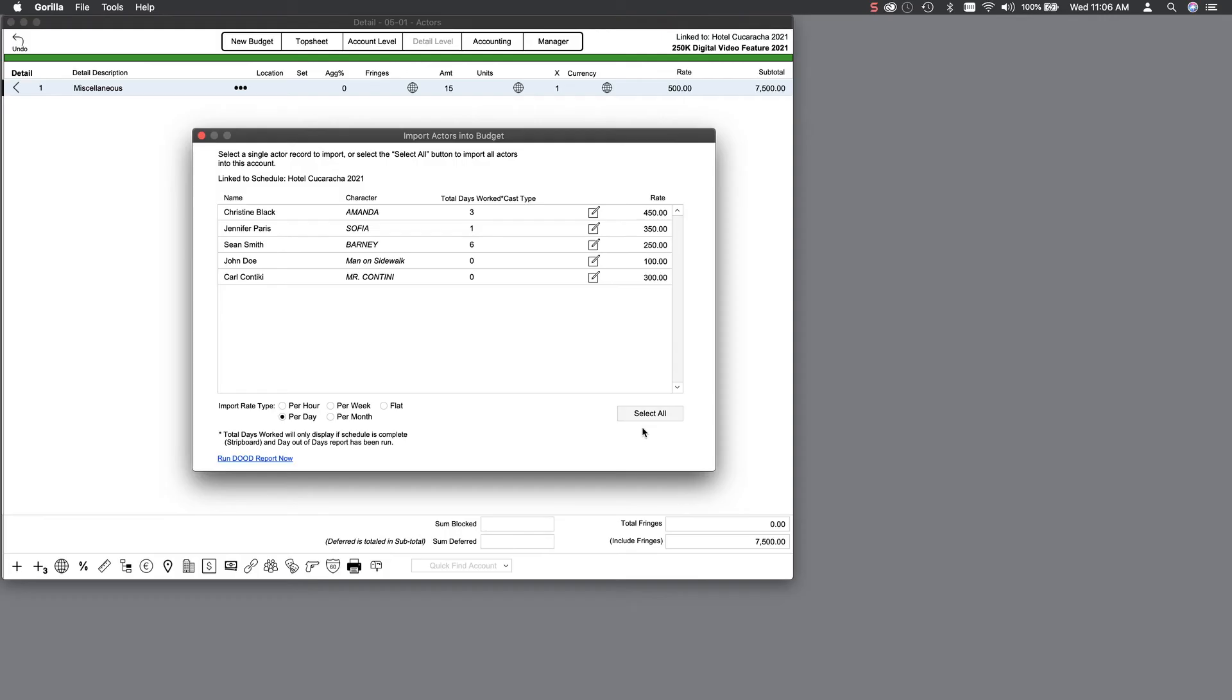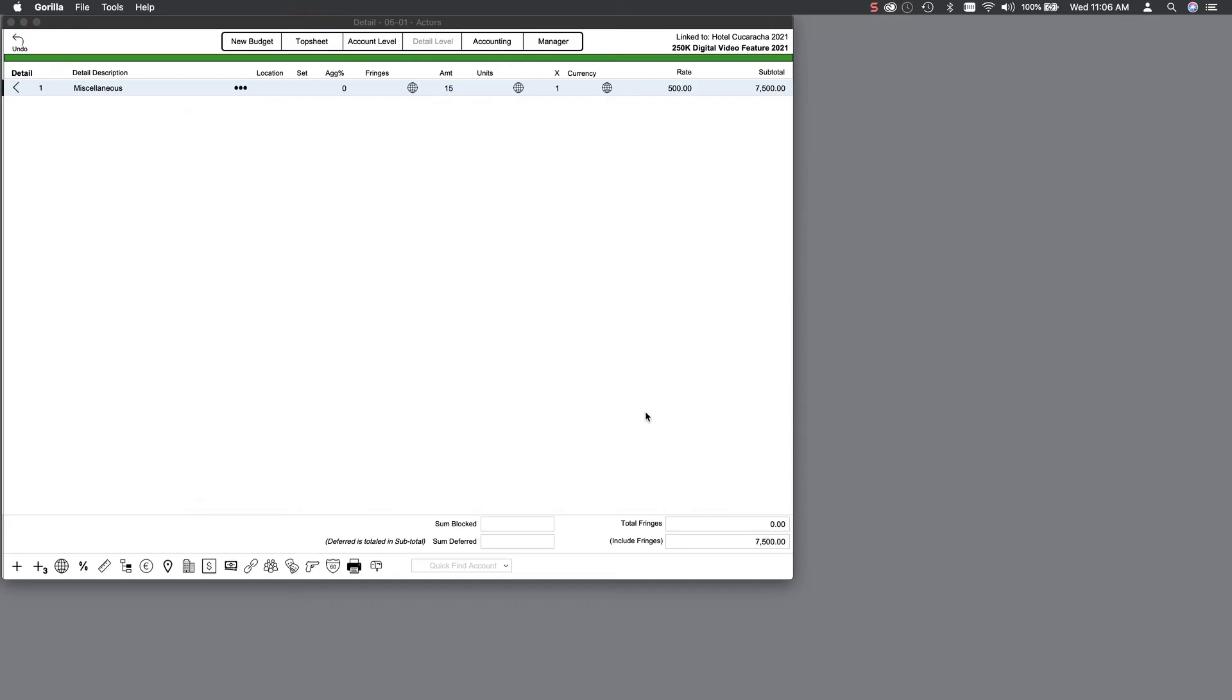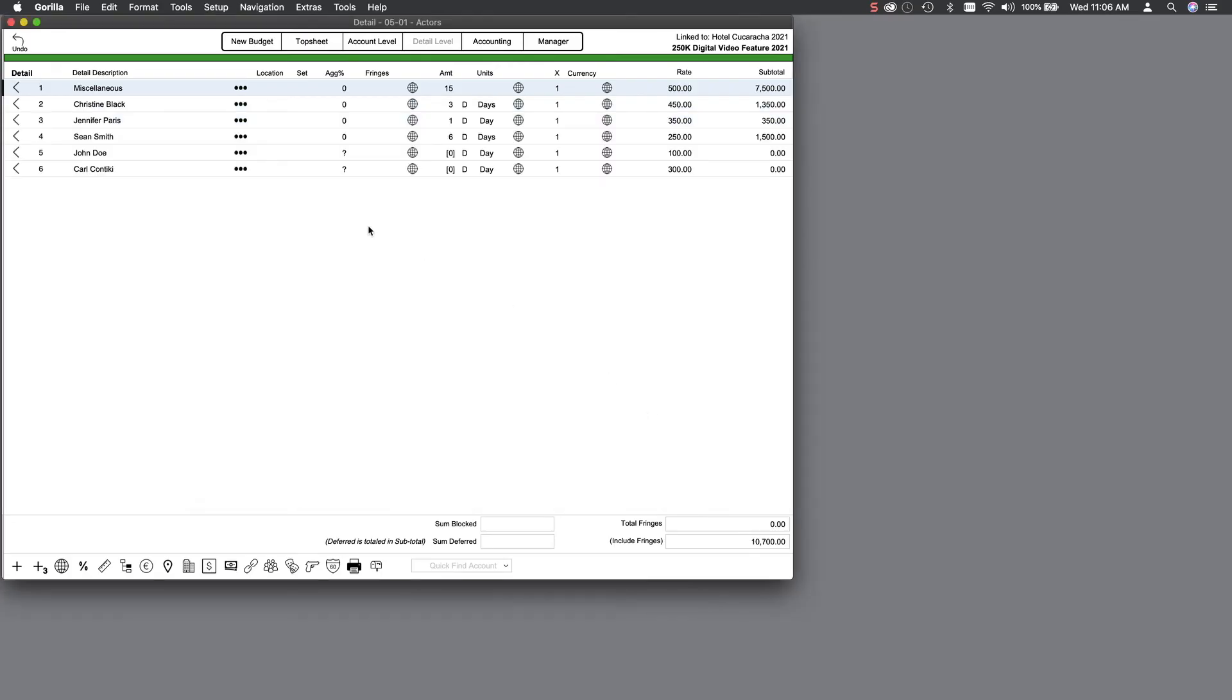Let's go ahead and click on the Select All button to import all actors into our budget. Notice that not only did the actors import with their rates, but the days worked imported into the Amount field and automatically calculated the totals we need to finish our Talent category.